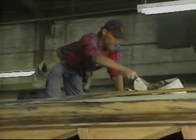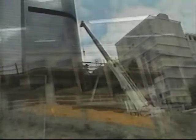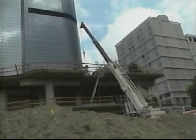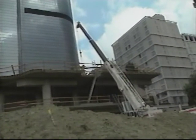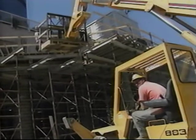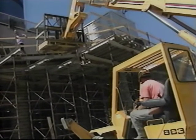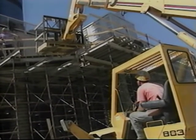While the cars were being dismantled piece by piece, construction at the new home of Angel's Flight was well underway. In order to achieve the same angle of operation as the original flight, a podium extension was built onto the edge of California Plaza. This podium would become the platform for the station house, as well as provide the necessary space for the new drive and cable system.